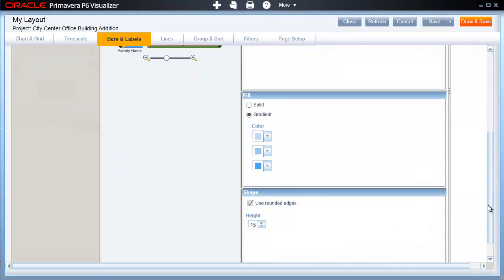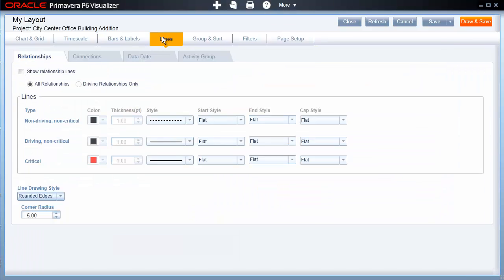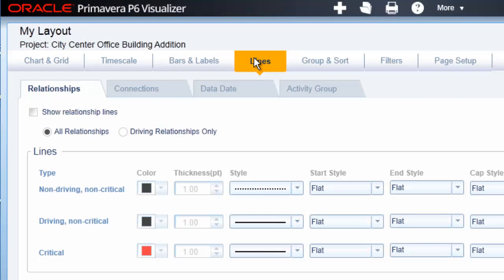The Lines page allows you to modify the Relationship Lines, Connections, the Date-to-Date Line, and Activity Grouping Lines. The Relationship Lines have additional functionality for showing non-driving non-critical, driving non-critical, and critical line-style options.